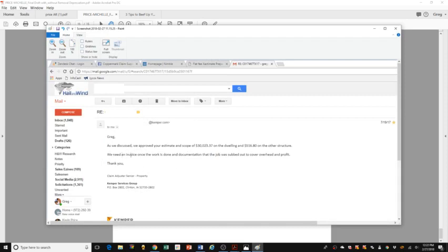All he needs is an invoice once the work is done and documentation that the job was subbed out so that we can cover the overhead and profit. The main response we get, or the average response we get from all these contractors is, we really can't argue with all of your documentation here, so send us proof that the work's been completed and we're good to go. It's been cost incurred.